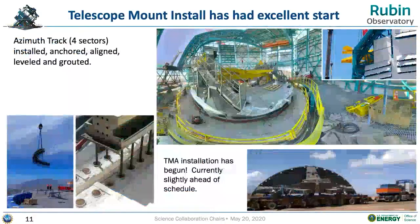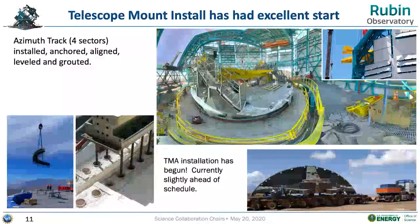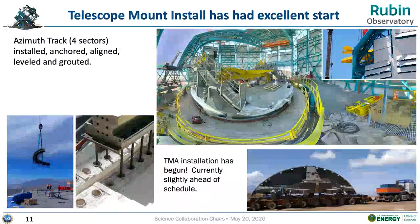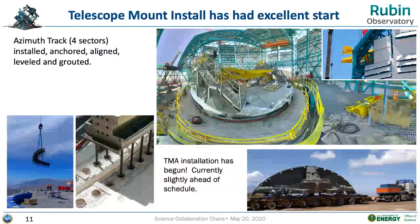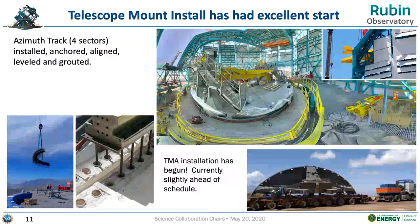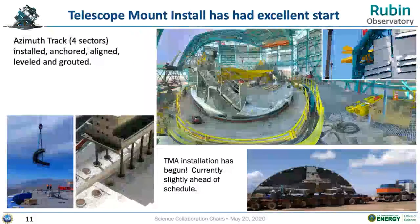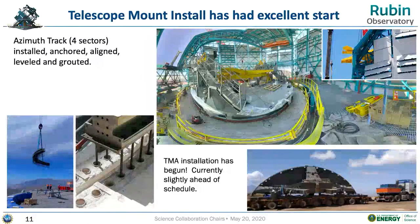At the same time we started work on the telescope mount assembly (TMA). This began with the installation of the azimuth tracks — which you see in the lower left — onto the top of the mount pier up on the summit site. The panoramic view in the upper right shows progress just prior to the shutdown.